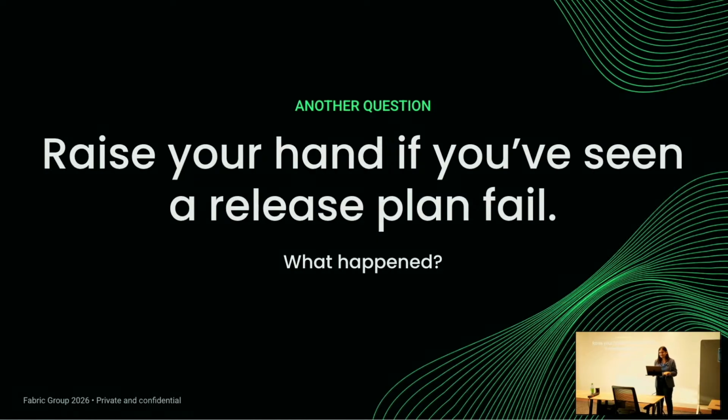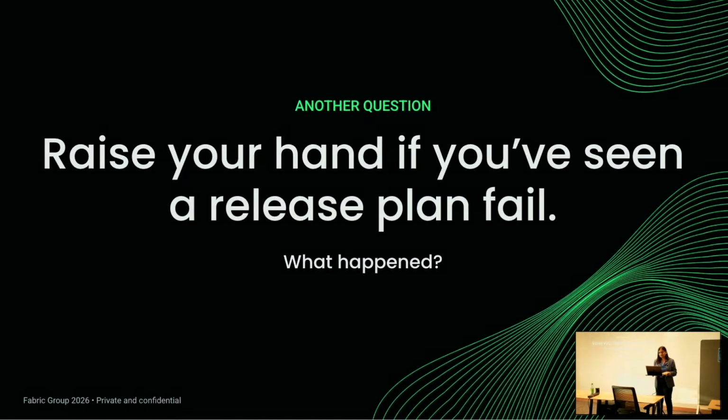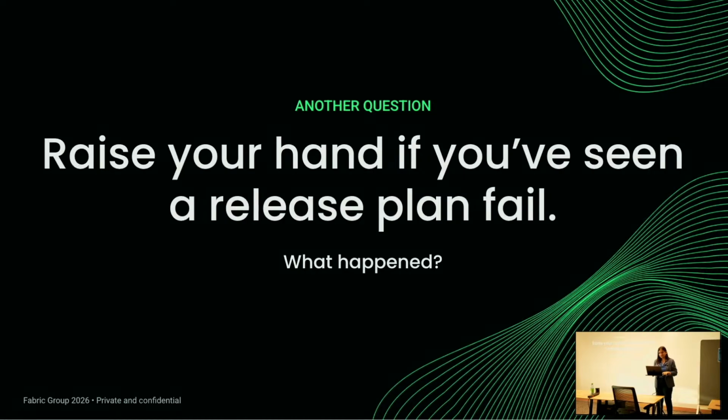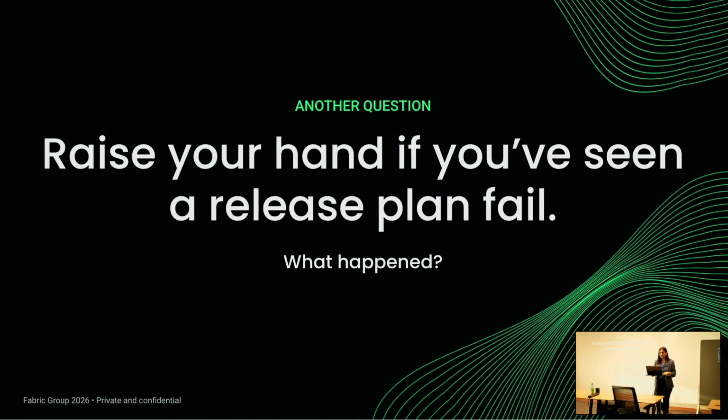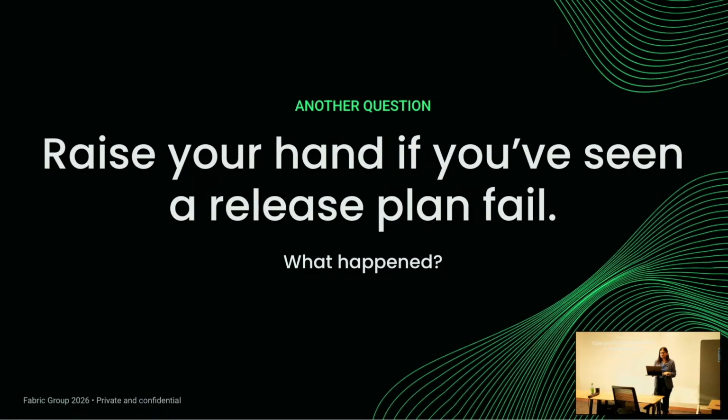Then the customer feedback that you get. Suddenly, you already have a scope planned for a sprint, for example, and then customer feedback, requests for hotfixes, and many other things come up, right? And they can basically derail the whole thing. Either you end up delaying the deployments, or you shrink the scope, or there is a trade-off that you need to take care of. So that's what can derail your release plan.